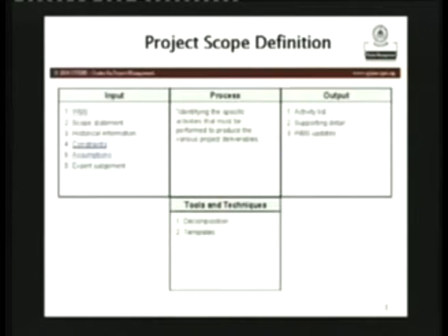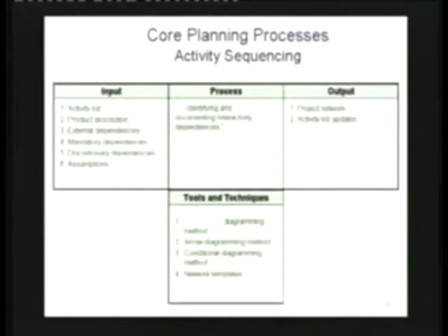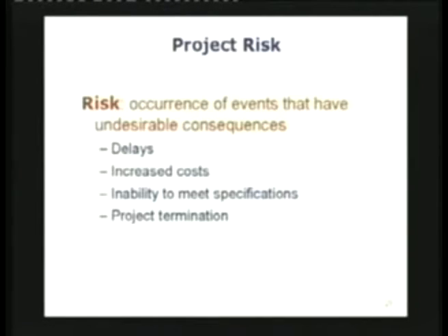Supporting details would be there. Work breakdown structure would be there. These are like updates, details, more details of the thing. Similarly, you've got activity sequencing. Not all things would be started all at once. Certain things would be done first, certain things would be done later. And I've got to make sure I've got this sequence right. And that's determined pretty well by technology, the technology for building the process. This is something there all the time.